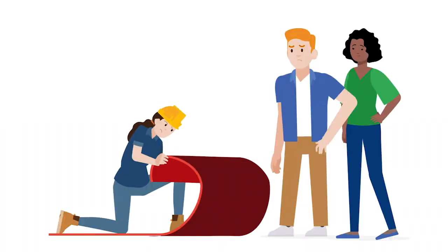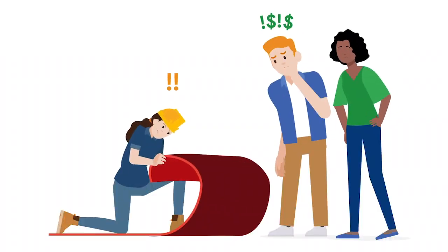You, the project manager on this particular construction job, have budgeted to have the carpet removed and the old floors sanded and stained. Bad news, you pull up the carpet and find that the floors are in bad shape and rotting. They'll need to be replaced or repaired, which could be costly. So your timeline and budget are likely to take a hit. When it comes to who takes on the responsibility of managing the changing scope, it'll be you, the project manager. But depending on the project, you probably won't do it alone.